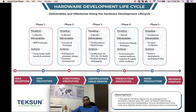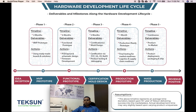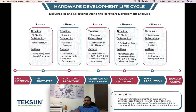Phase 4 is the beta production test run. We produce a small number of units and send them to initial potential customers to get feedback. If any minor changes are needed before mass production, they are addressed in Phase 4. The timeline is around 1 to 2 months, and the deliverable is the final product ready to go into production. Phase 5 is the actual mass production, which is a continuous timeline.